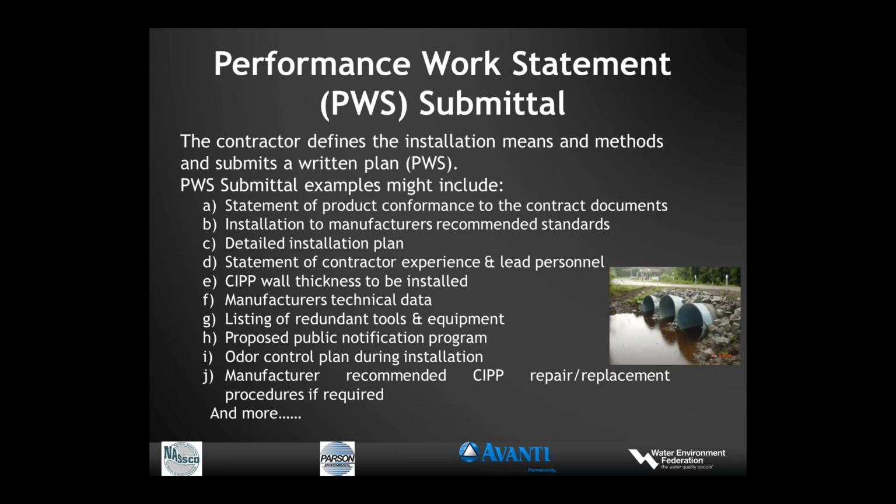This needs to be set straight up front because you may have been involved in projects where you're well into the submittal process, well into the project, and it's determined that the product that's being provided does not meet the specs. Well, you need to get over that hurdle right up front.